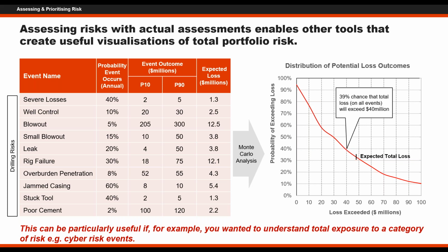And I think about one of the ways you may use this, if you take your risk register, and your risk register has some information, your risks are different by, say, types of risks. So for example, we might group all our cyber risks together, or we might look at risks in a particular part of the world, or risks in a particular department or business unit. You could actually generate these sort of loss curves in those chunks, and that can also be quite insightful as you start to look at your business and you understand the pieces of it, or the particular types of risk that threaten you most. And so, for example, you may find that your cyber risk curve here looks a lot more severe than a lot of your others.